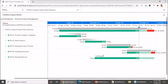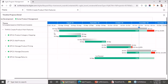We introduced planned start and planned finish fields on the agile work items so that you can provide the necessary dates for work items you want to plan against. The percent progress shown here is still based on the percent progress preference we have chosen. For each card type, you can have a percent progress method selected. In this case, the theme's percent progress is based on child percent complete — so the number of epics completed for this theme contributes toward the theme's completion and determines the displayed percent progress.